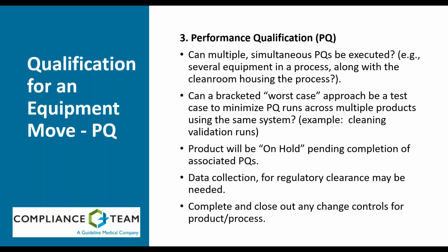At the end of your qualification, you're going to have to close out all your change controls. There's going to be some regulatory stuff before you'll actually be able to sell product. Even if it's taken off hold, you won't be able to sell until at least your regulatory clearance is done. And maybe there's a change action in your change control that allows you to sell product before the whole change control is closed. But you need to be careful about how you word those things and how you actually execute.